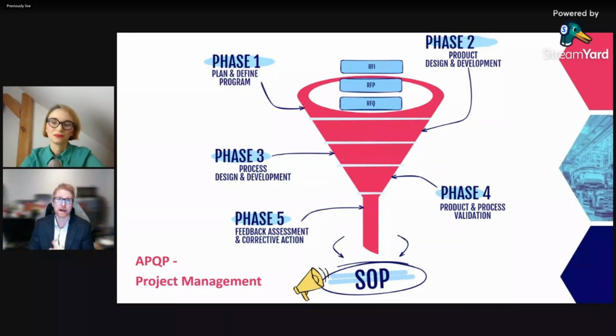And then after that, we get a request for quotation. So the supplier will say, okay, based on what you want, this is how much it's going to cost, based on the volume or the minimum order quantity or the sales forecast and so on. So this is where we are, right at the beginning of the project. Before we make tooling, before we commit to anything with the supplier, this is the point of this webinar: we're putting the key requirements in at this stage.